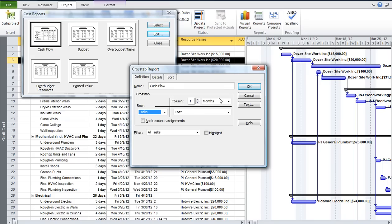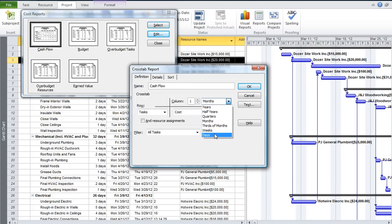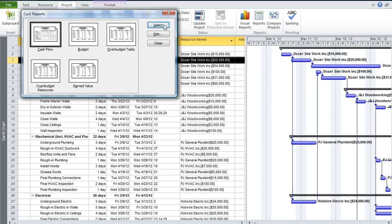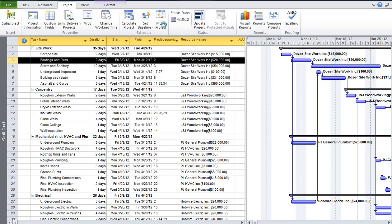Let's run it by task first. You can set the time period — months, weeks, thirds of months, days, however you want. Let's run it for months this time. I'll click OK and then select the report. It should run for every task in this project by month, and that'll give us a feel for how the cash outflows are going to be for this project.